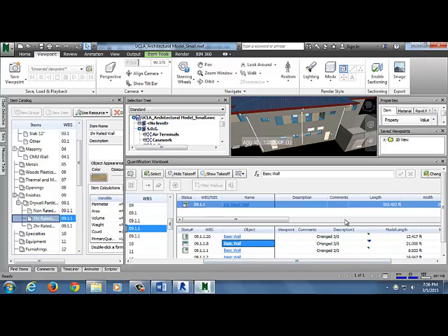Yeah. Can you do the same thing with 2D models? We are still getting, just looking at just about everything is PDF plans. Yeah. So if you imported PDFs and did markups, it wouldn't be able to do any change analysis because it's not selecting any geometry or items. You're just kind of coloring on top of nothing. But if it was a DWF and you linked up the 3D versus the 2D and you did takeoffs on there, yeah, it would totally pick up those changes.